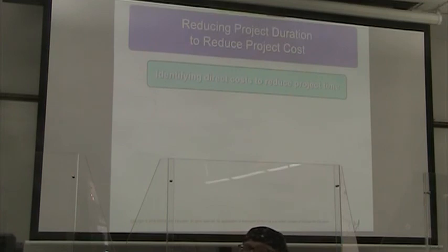It won't be overhead, right? They're not going to say, oh, by the way, next week your overhead is going to be doubled. No. Because the cost of the building, the insurance, the maintenance, all of that is going to stay pretty much the same, right? So it's going to be the direct costs that are going to be a problem.